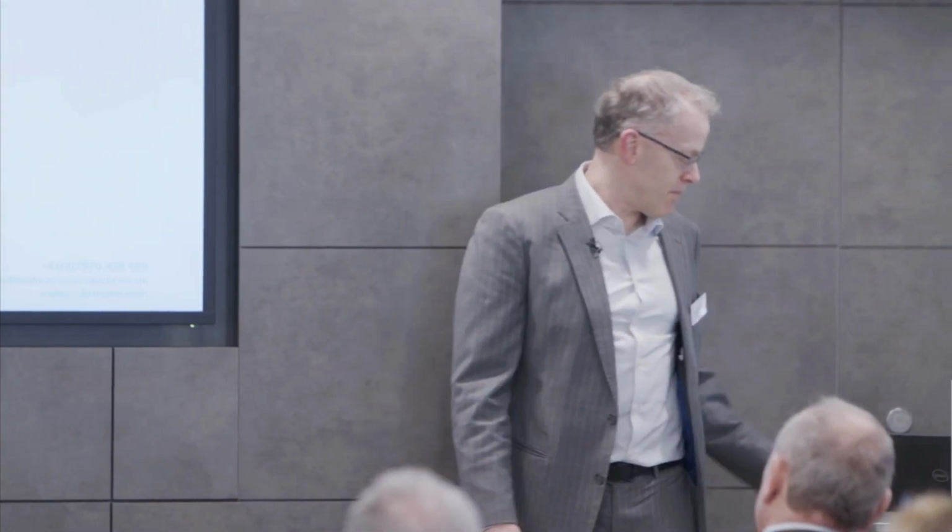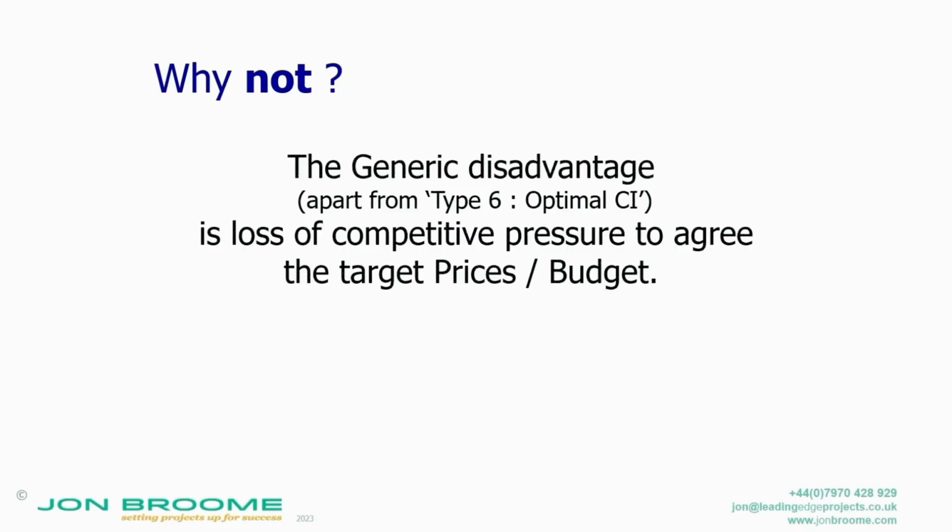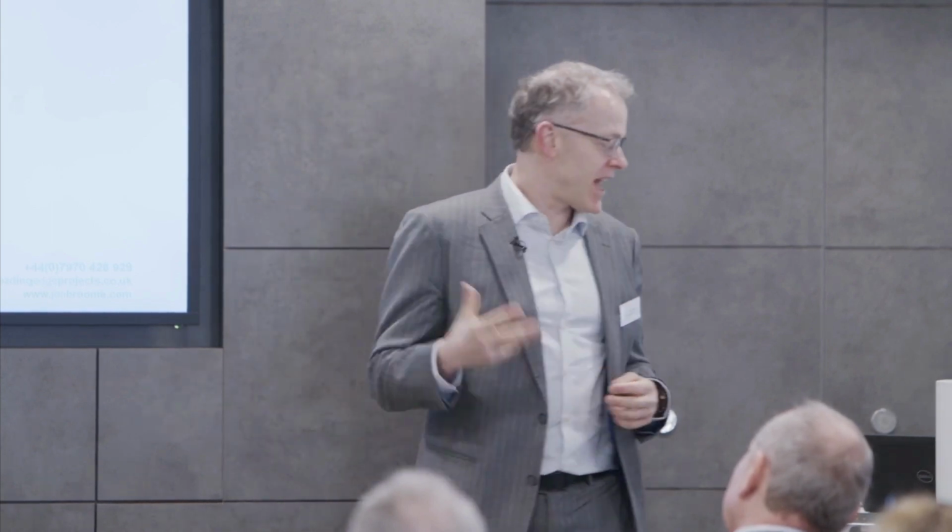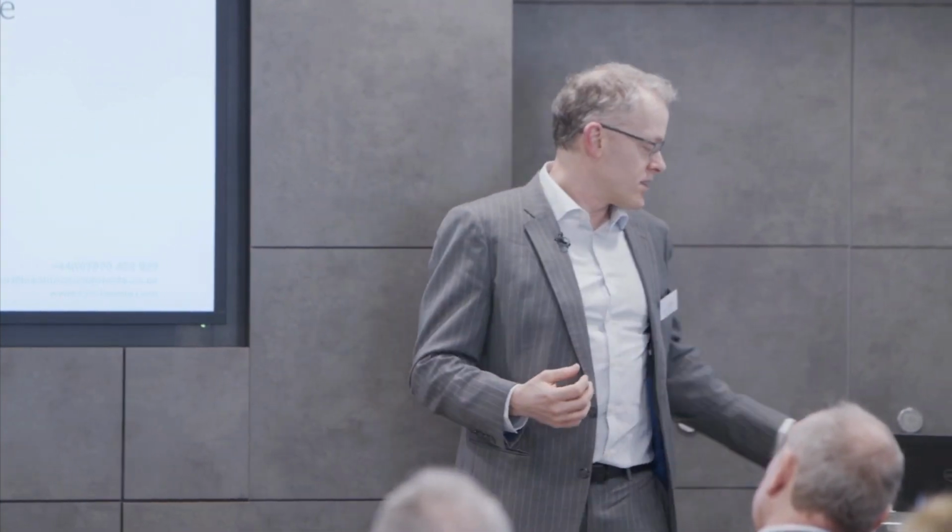But why not? Well, the main why not in early contractor involvement is that effectively you start to single source a contractor, yeah? And therefore, depending upon the timescales of your project, the closer the deadline to start construction, because you need to finish the asset approach, the more they have you over a barrel. And so that's the main deficiency of it. So what does that imply? I'll say more about that later, but it means that you need to nail how they're going to build up the prices, etc. And that's one of the big things where I see potentially ECI falls down.